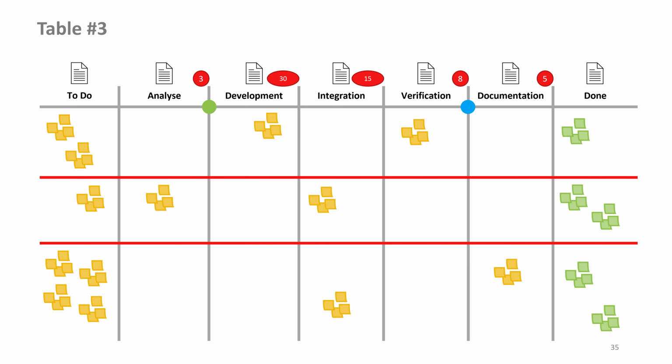Let's imagine that we are working on 8 tasks in parallel in development and they are finished at the same time. However, only a few can be closed because we have 2 people in quality assurance who do the testing. Those 2 people get buried with a huge mountain of work, and this of course blocks the flow at some point.